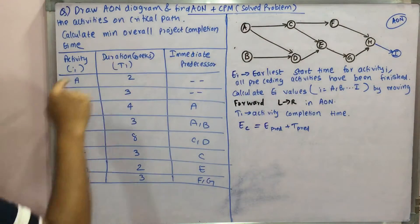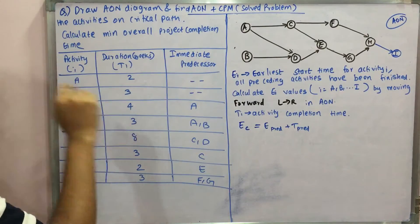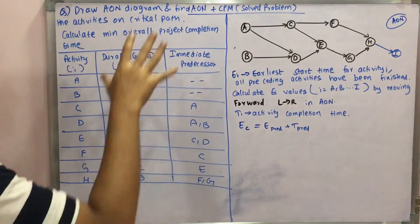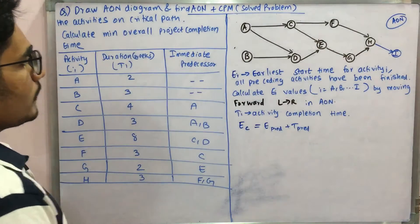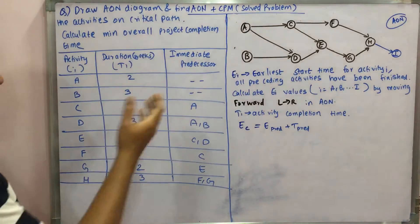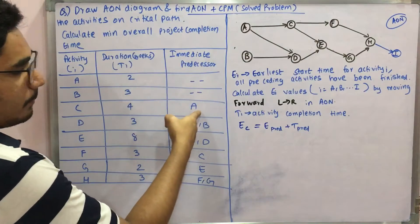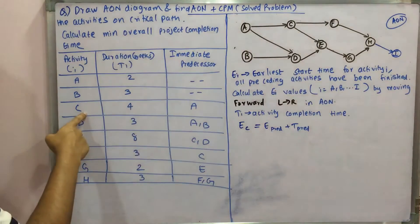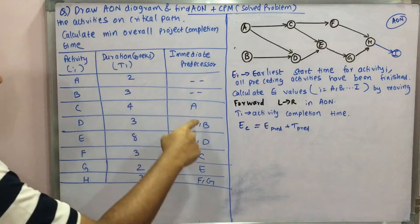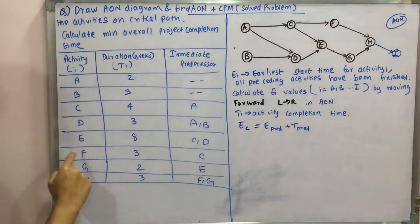For activity A you have two weeks for completion, for activity B three weeks, activity C four weeks, and so on. The third column is the immediate predecessor — that is the prior activity which triggered the current activity. Only after a predecessor's completion can you do the current activity. For example, only after completion of activities A and B can you do activity D, and so on.